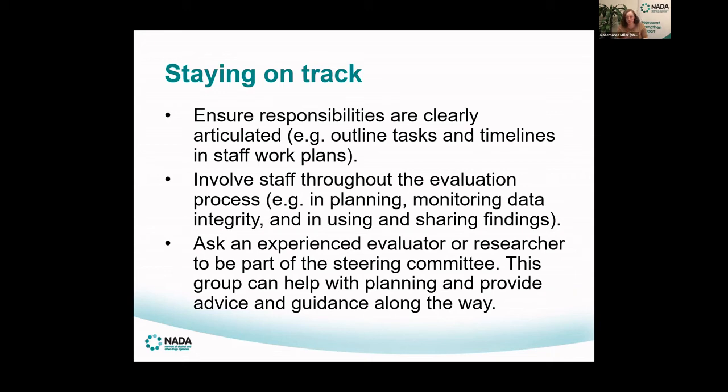What can also help is implementing some basic project management strategies. So when I was conducting the evaluation, I wasn't just thinking of the broad picture of the 2 to 3 years that I was involved in the evaluation. I was thinking long term, but I was also thinking on a week-to-week basis. So I was thinking about what things need to be checked each week. Do I need to follow up with anyone? Do I need to contact this person? If this thing is happening in 6 months' time, when do I need to start planning that?